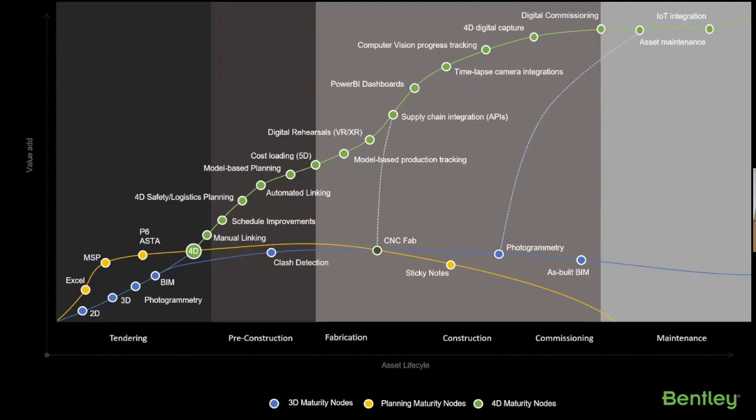And then we built this ability to pull data out through a SQL exporter, and that is what allows you to connect Power BI to that. So imagine what this means is that you can now get real-time tracking of, say, discrete manufactured components, and then you can plot that, pull it through into Power BI. So I think it's really powerful, and that's where I see the industry moving.